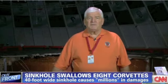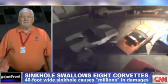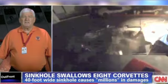You can look and see that some of that, the bottom of that is not resting on soil, and so the first game plan will be to stabilize that, and then to stabilize the area around the sinkhole. And we estimate, our construction management firm estimates that'll take about 10 days. And then they're looking at 2 different ways with regard to extracting the cars.